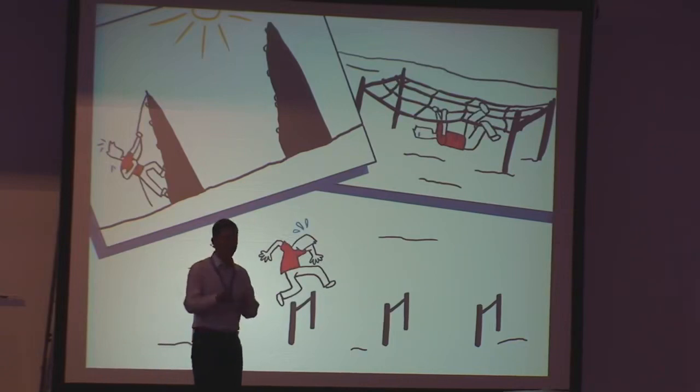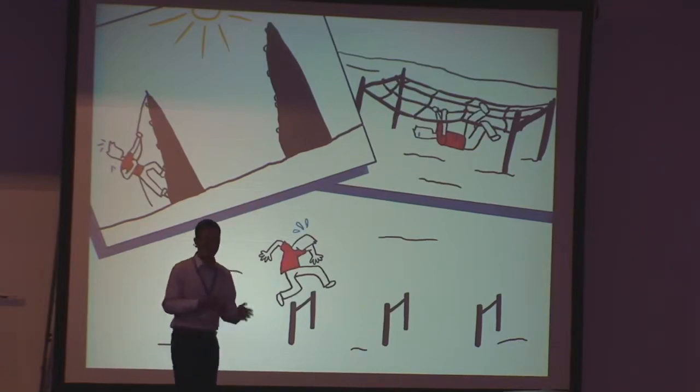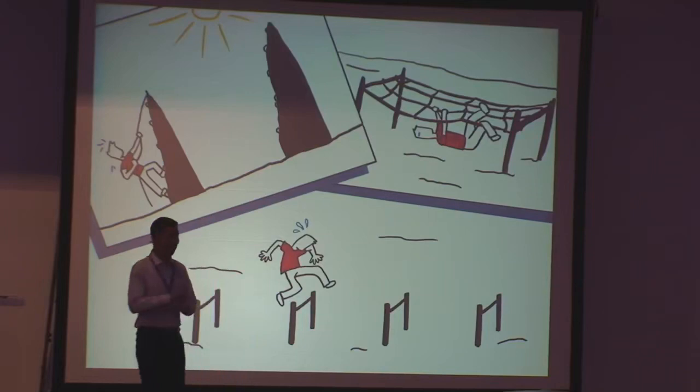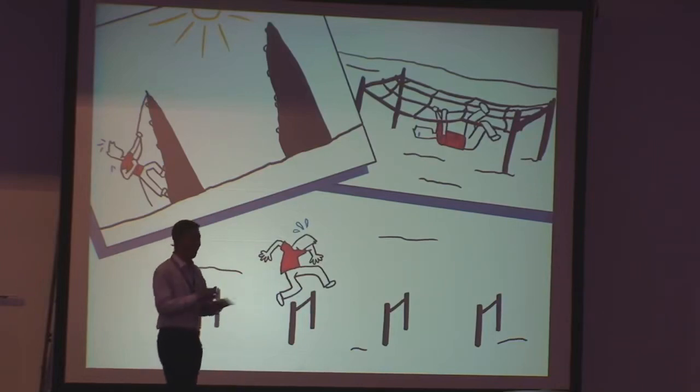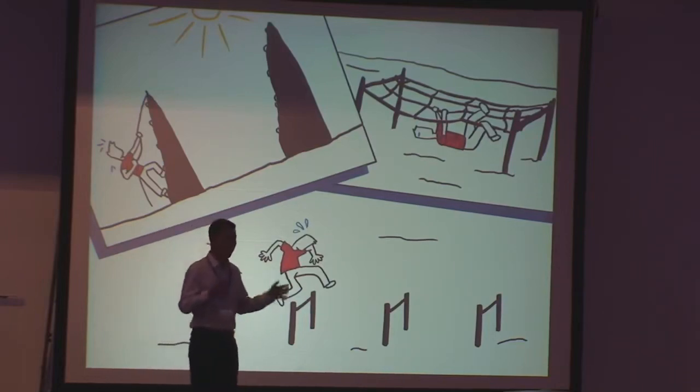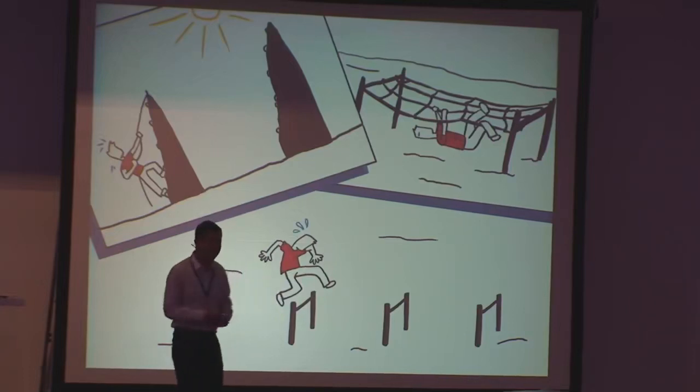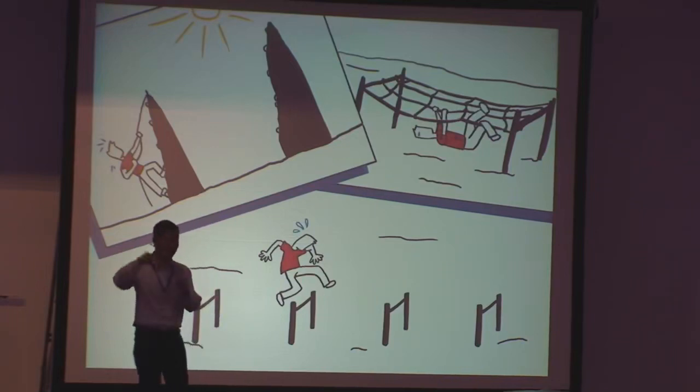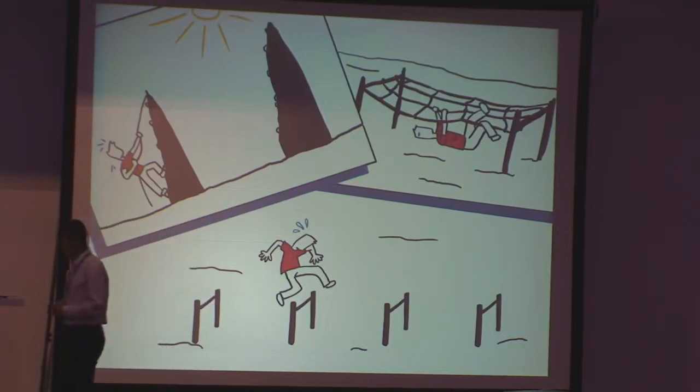We're going to split off your task and make it a separate story, and we'll push that into the next sprint. And that completely violates everything about Scrum, right? You can't take the acceptance criteria out of the story and just make it in the next sprint. But they would do that so that they could take credit for the story and have their story points completed. And there's some balance here.